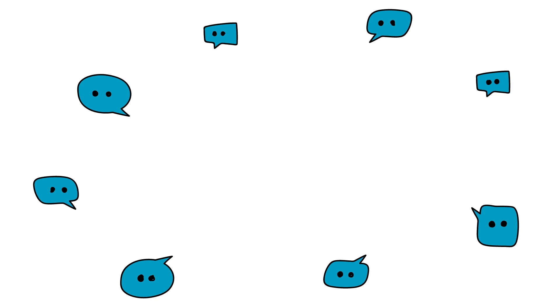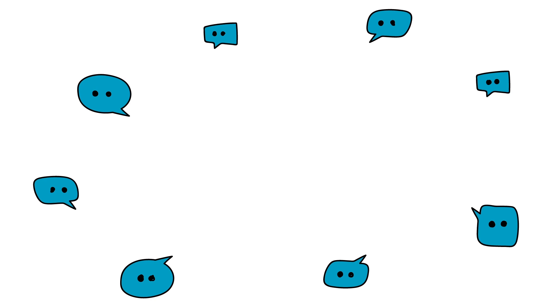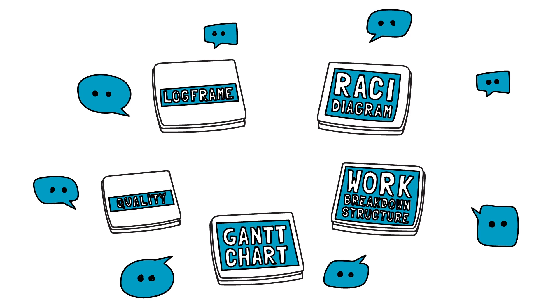Fortunately, because the team has been using the project management tools, the answers to questions in the implementation plan can be found in existing documents: the log frame, the work breakdown structure, the Gantt chart, and the RACI diagram. More complex projects may also include sections in their plans that address procurement, quality, communications, and risk management.